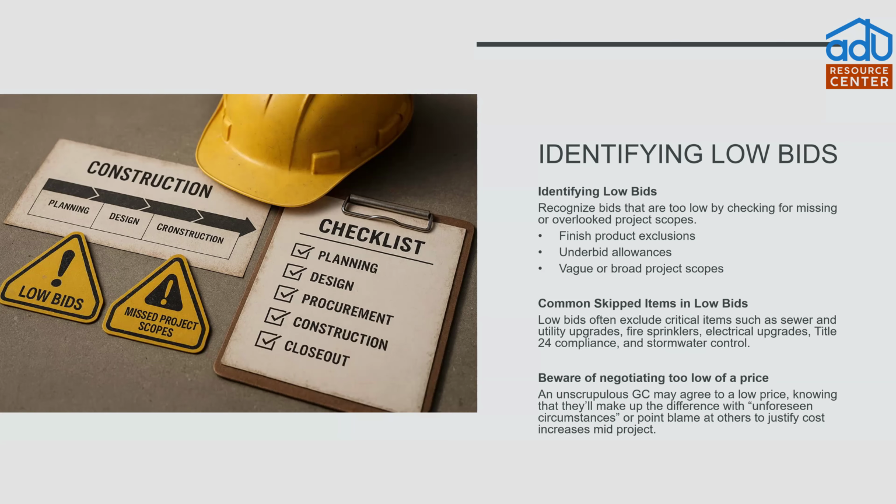If it sounds too good to be true, it is. Generally what we do is when we gather bids, we throw out the high one because they're overcompensating. We throw out the low one because they missed something. And that middle core in the middle, that's usually the real deal. That's usually the truth. So we'll gather a pattern of prices for people, and we use our sensibilities and scope of work, not just square footage price, but based on the scope of work. And that's the right way to do it.